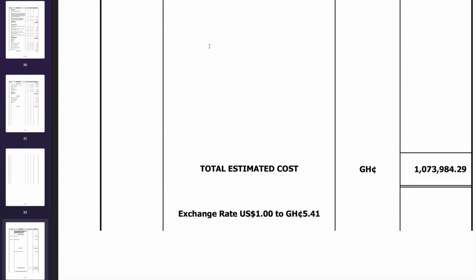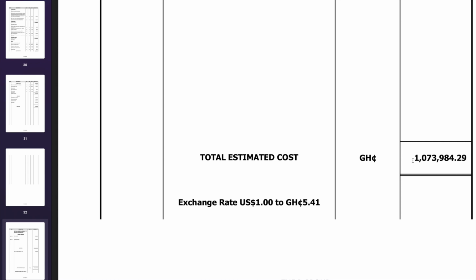Like an additional 20% cost came in there because during COVID they printed a lot of money and we experienced some insane inflation, as it's still happening to this day. So let me share my screen with you and let's look at the BOQ. This is an estimate, keep in mind guys. This is known as the bill of quantities. After the architect finished the detailed drawings, they know how many doors we need, the length, and the size of everything. So then they go in and give you an estimate, and that is known as bill of quantities, BOQ. And that amount is going to change as time goes on because of inflation change.